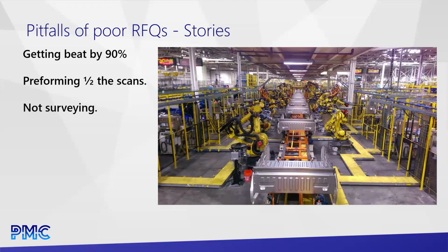Anytime we do a quote, assuming it's traditional scanning, you're going to see we're going to do 100, 200, 300 scans on your site, roughly. We put that number right in there so you know what you're getting. Because as we talked before, a scan takes 2 to 15 minutes to run. The number of scans equates to the number of hours we're going to be on your site, which equates to the cost of the job.